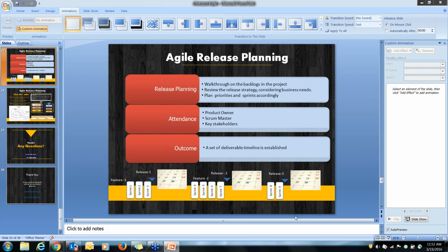So what I see here is the Scrum Master is not performing the role properly. If at the end of the sprint you come up and say we need 1 more week to complete this sprint, then there is something wrong in the team, because this should have been identified during the sprint itself, way before, because you are giving a regular update to the Scrum Master. So the Scrum Master knows how the team is progressing and the state of the sprint.